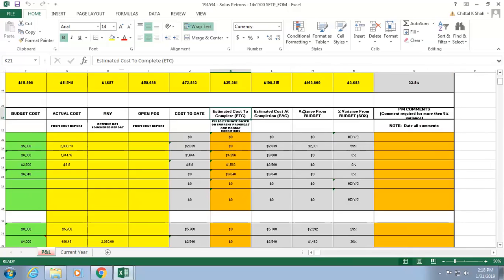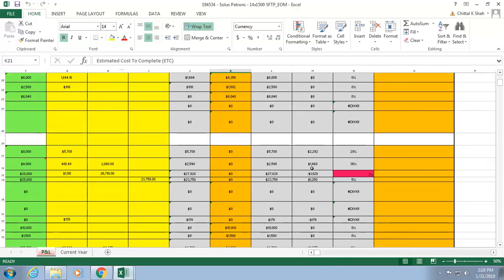What they say is, rather than just telling us at a high level, tell us at a micro level, once you start going off your budget, why and what, so we understand where this project, this task, this business is going, right? So for everything which is going negative 5%, we try to go and put some kind of explanation there.